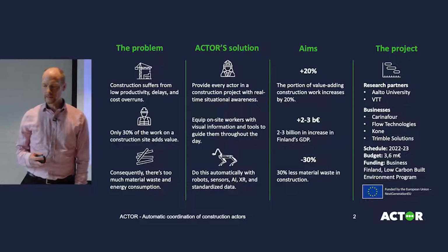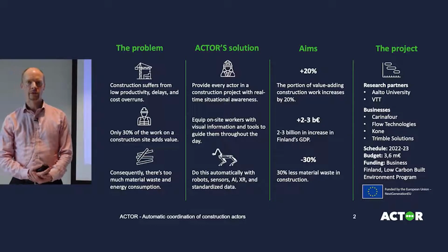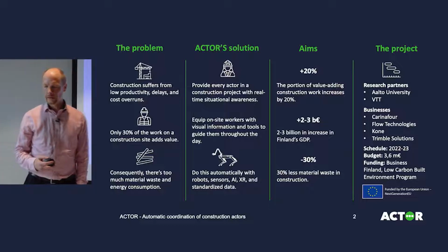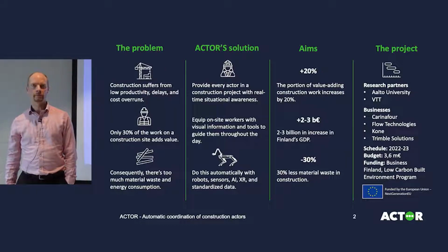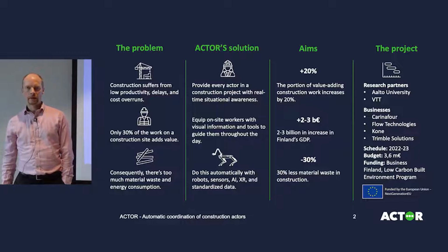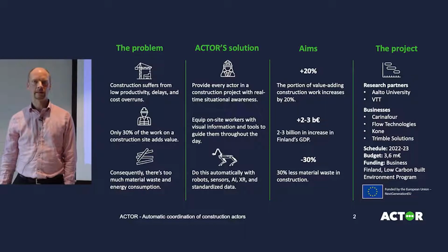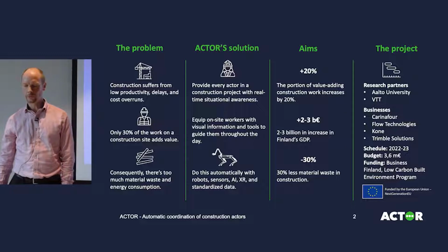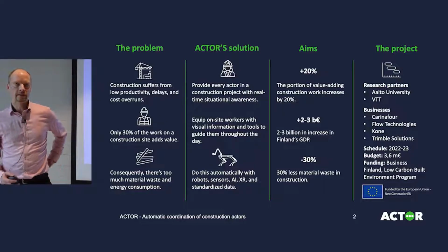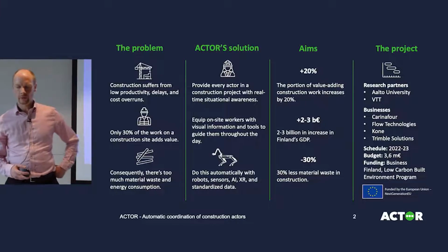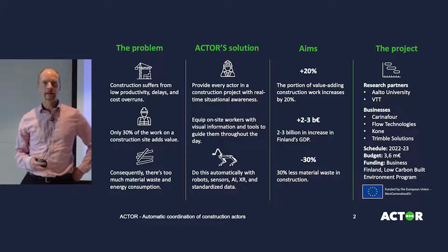The project has two research partners, Aalto University and VTT, and then we have industrial partners, Carinafour, Flow Technologies, Kone and Trimble. The project will take 2 years, starting in April 2022, so we just recently started, and we will finish in April 2024. The overall budget is 3.6 million, and we get funding from Business Finland and the European Union Resiliency Fund.